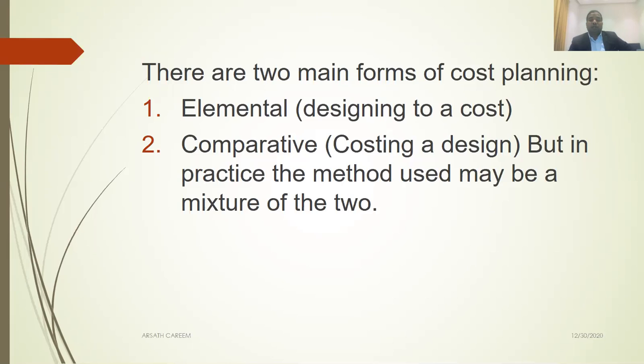He needs to make sure he designs the substructure part within that amount. That is called designing to a cost. The structural engineer should always aim to finish his design within that cost. That is the best practice.